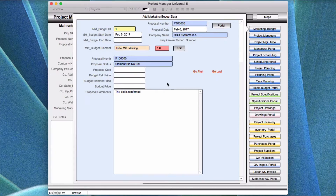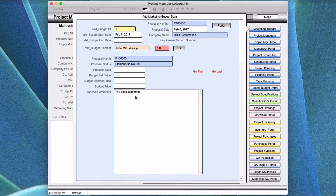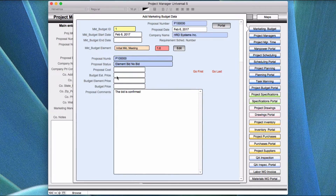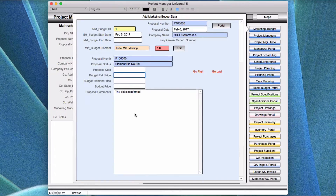For example, if you're talking to this client at a kickoff meeting for the proposal effort and asking what items he didn't cover, this is critical. You need to say he didn't state he wanted survey work, and the key question for your company is to ask why. If the client did not want the survey portion done, which leads off the entire project, you may want to ask: do you want us to give you an estimated cost for that? Hence the reason for the budget estimate on this particular line, where you might estimate through your project production group what it would take to do the survey.